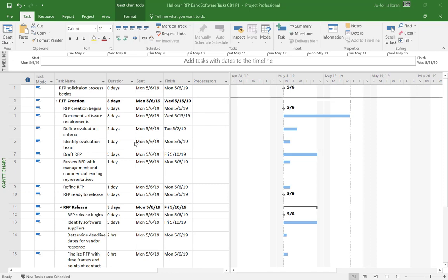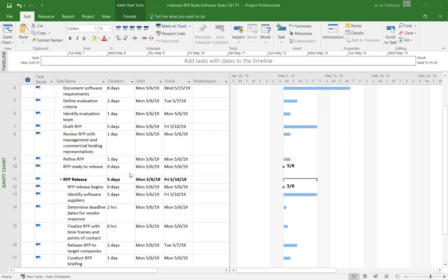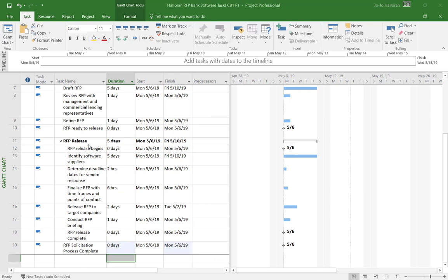Now I have finished putting my tasks in, and I went down here to the RFP release phase. And I double checked and made sure that all my durations were correct. Then you need to make sure that here on determine deadline dates for vendor, this is only 2 hours, not 2 days. And the same here, we have 6 hours and not days. So make sure that when you are choosing these, you put in hours instead of days.